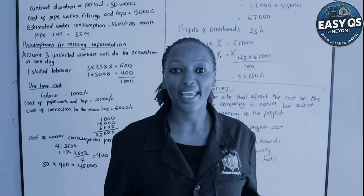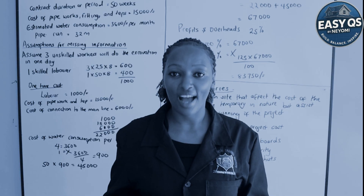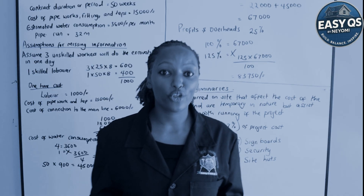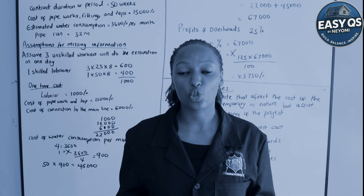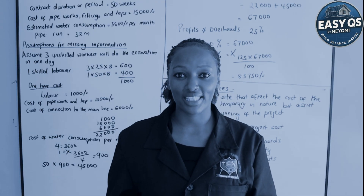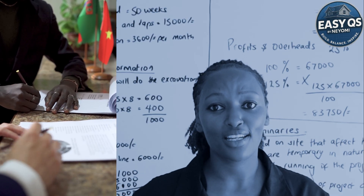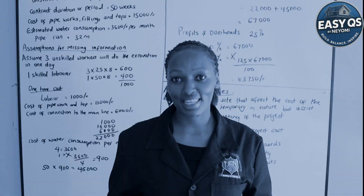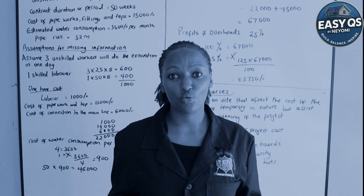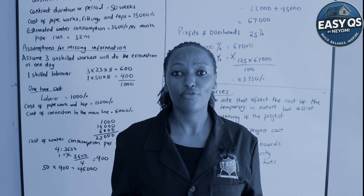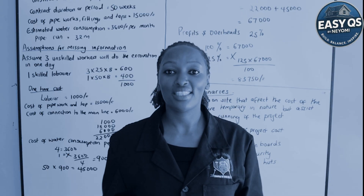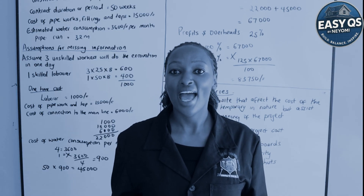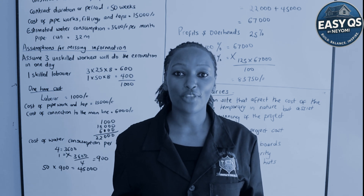When a contractor is being awarded a contract by the client and given a go-ahead to construct a building, they must have come to an agreement about how much the project will cost. The legal document used to show every detail of the cost is called a bill of quantities. Every tender — whether for roads or buildings — must have a bill of quantities. This channel covers calculating and estimating the costs of materials, labor, plant, equipment, profits, and overheads.